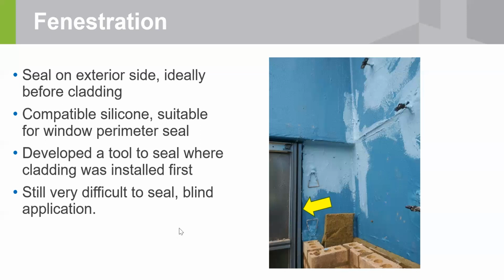All right, so with that window, that was probably the most bothersome part of this installation. The installers were telling me how they had to develop a special tool to actually seal these windows to the membrane. And it was a blind application, even with that tool. They water tested a lot of windows, and it was hit or miss whether they were able to seal them properly.